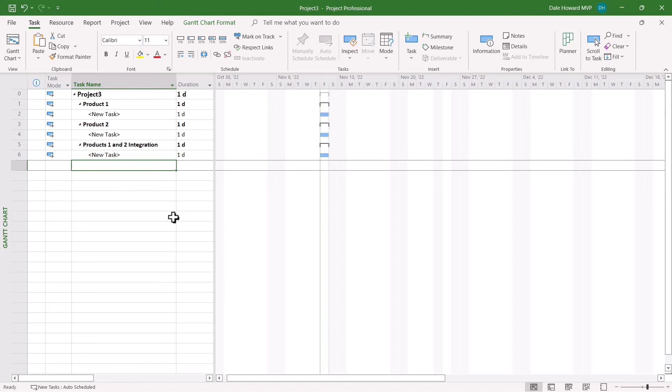Once you've created summary tasks that represent the deliverables in your project, then you can flesh out the task list for each summary section with detailed tasks that are needed to create the actual deliverable. So there's your bonus!